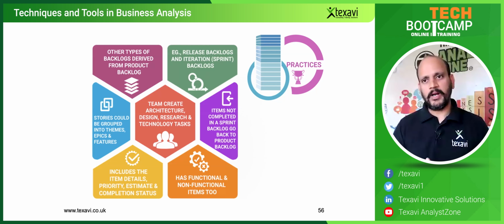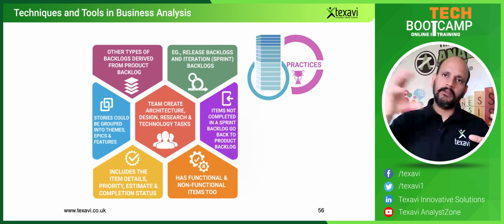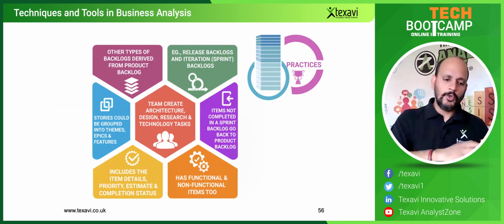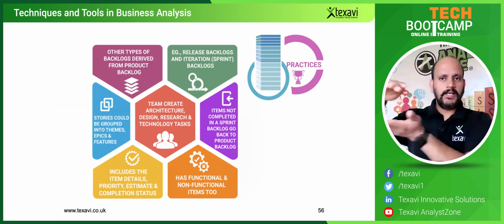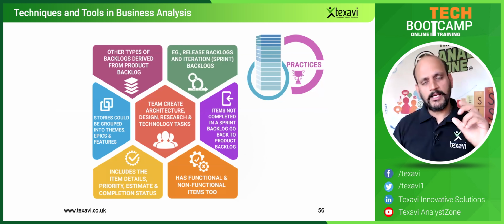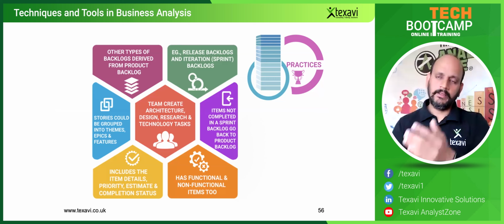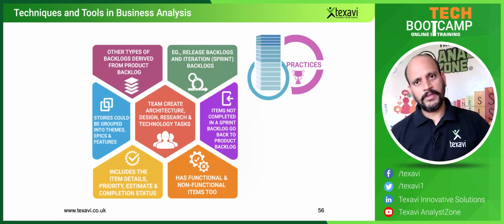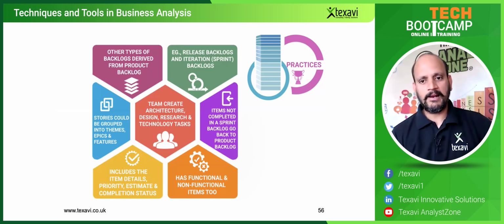Then you prioritize and take some things out of these 100,000 requirements and tasks, and assign them to a particular iteration. That's what we call the sprint or iteration backlog. These items are to be done in the first month, these 10 items need to be done in month 2, this is month 3, and so forth. That's called the iteration backlog, the sprint backlog in Scrum terminology. And the overall product backlog, you've got one, the backlog for the whole life cycle.